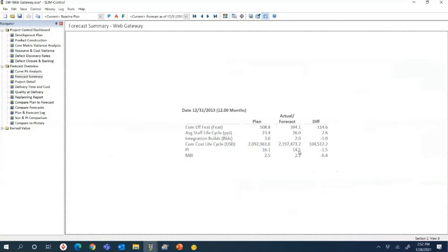So that's powerful stuff. So we can see if we're working to the level of productivity that we had initially planned. And this could also be if you're evaluating a vendor. The vendor came in with a certain schedule or cost goal, and a budget, and you were able to see what their productivity index is and if it's competitive with industry. So you know who to choose, right? If you're looking at different vendors, and you can track and see if they're working to the level they had promised.